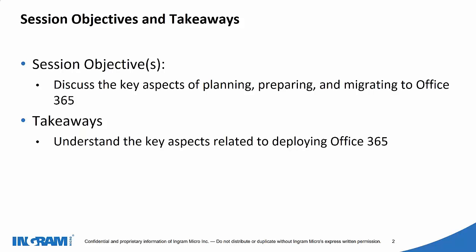or Lync. The next phase is preparation, that is setting up the Active Directory or Exchange, whatever Exchange they are using. Currently mentioned here is Exchange 2010, but you can also migrate 2013 and 2016, with the complete account creations and everything. The last step is the migration, that is migrating the data of your Exchange, your SharePoint, and your OneDrive to Office 365.